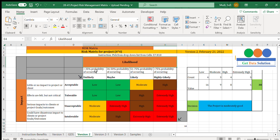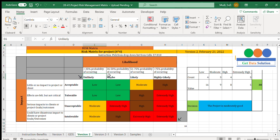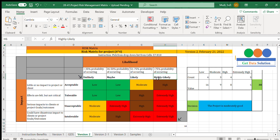The likelihood levels are defined as follows: if the probability of occurring is less than 25% it is unlikely; 26 to 50% it may occur; 51 to 75% it is likely to occur; and greater than 75% probability it is highly likely. These are the defined terms for likelihood in this case.